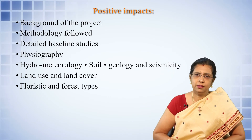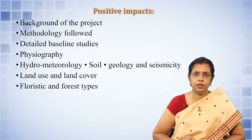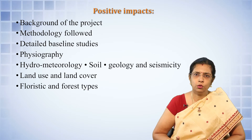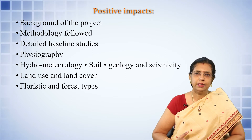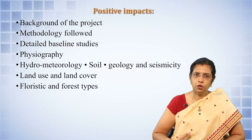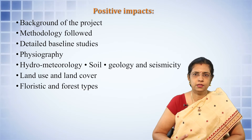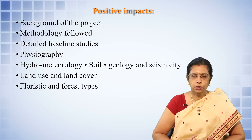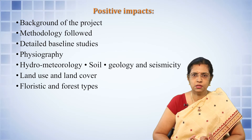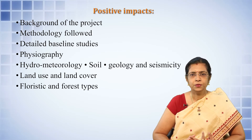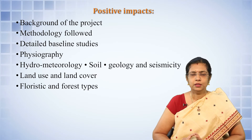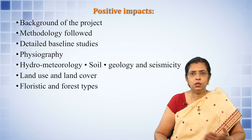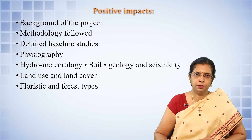In EIA studies, the background of the project must be understood and the methodologies followed must be described. Detailed baseline studies need to be conducted covering physiography, hydro-meteorology, soil characteristics, geology, bedrock characteristics, and seismicity of the area, including whether it is a seismic-prone zone. Land use and land cover types, floristic and forest types, faunal elements, and aquatic ecology and fisheries must also be clearly described in the submitted project.